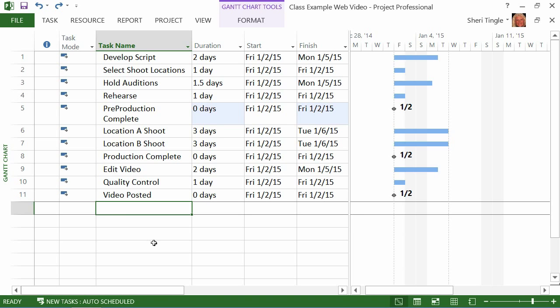You absolutely could. So as you're building your projects, be thinking about what are the naturally occurring areas that you want to stop and say, wow, we're successful. We have accomplished up till that point. And then create it's like a summary line. It's a title that you want to give that group. And when you assign 0 for the duration, it automatically creates a milestone for you.